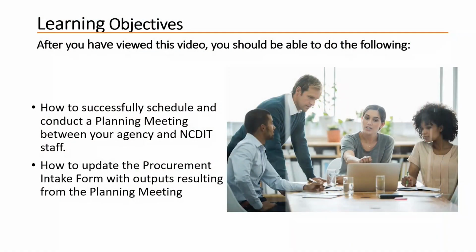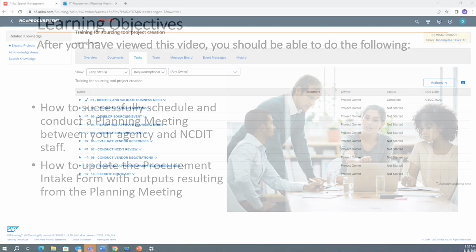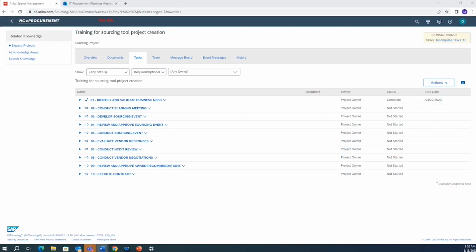After you have viewed this video, you should be able to do the following. Successfully schedule and conduct a planning meeting between your agency and NCDIT staff, and update the procurement intake form with outputs resulting from the planning meeting. Though the conduct planning meeting phase is optional, it is designed to bring together the appropriate parties from both the agency and NCDIT to introduce and understand the business needs, identify the team, a sourcing strategy, and develop a timeline.